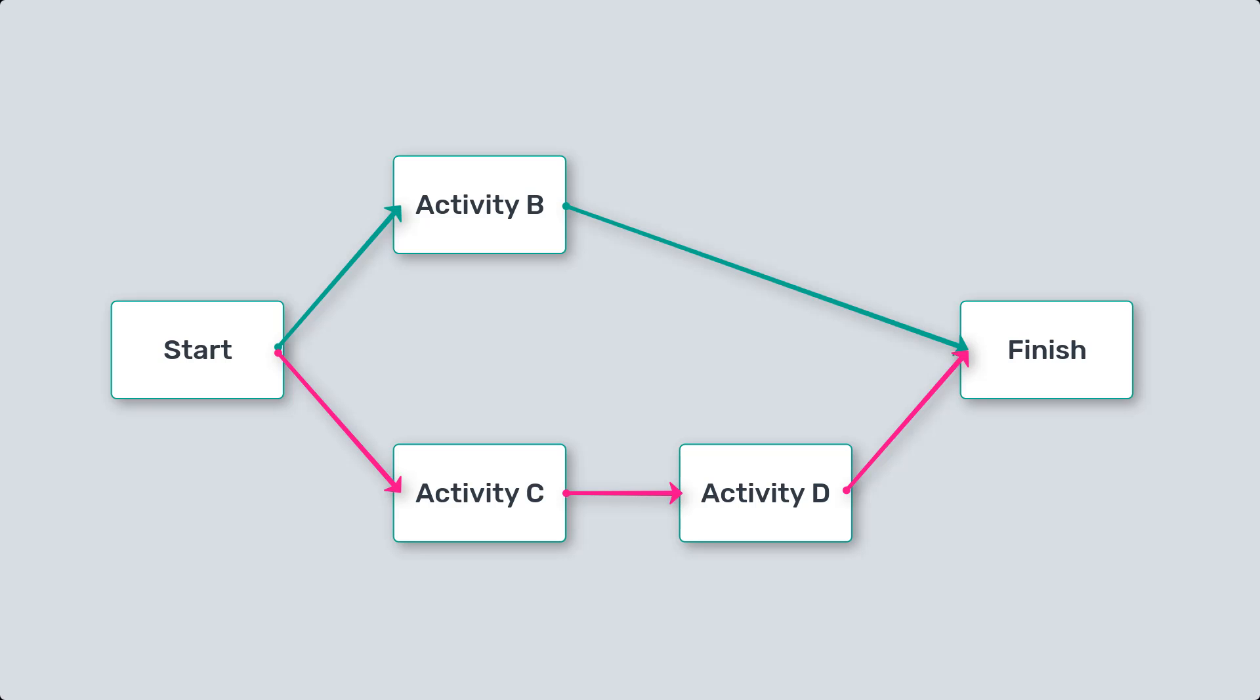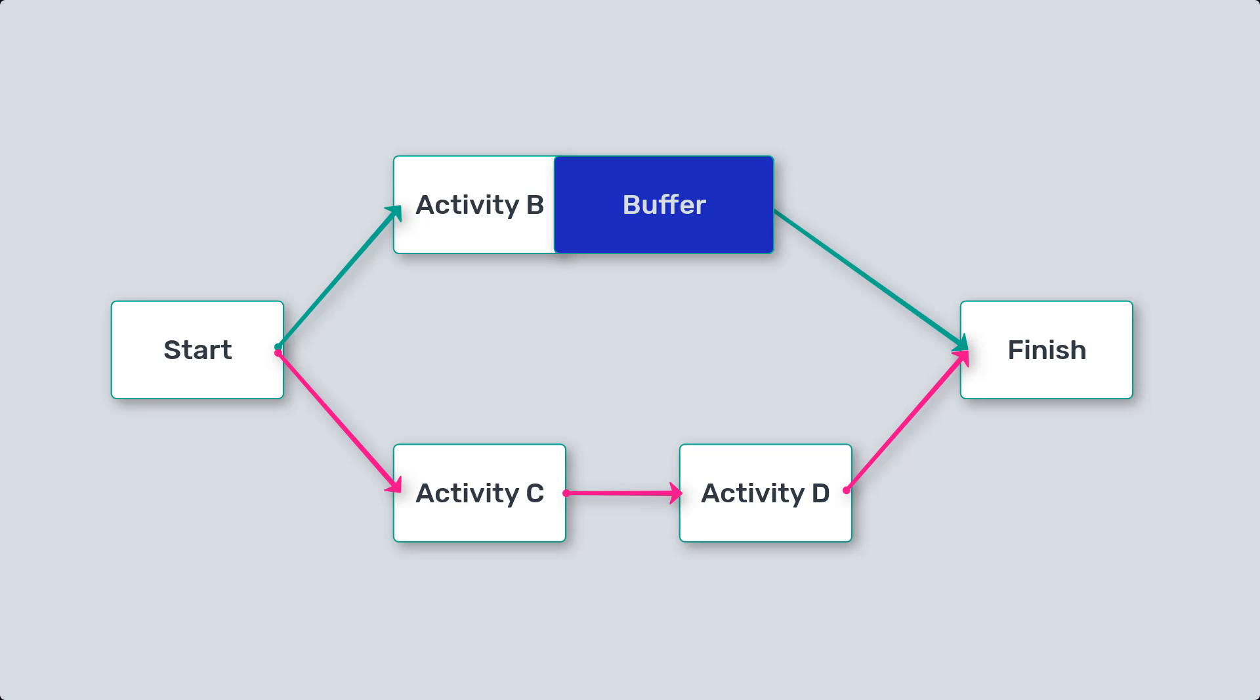To protect the project from uncertainties and variations, the critical chain introduces the concept of project buffers. These buffers are strategically placed at the end of critical chain tasks to absorb any delays without affecting the project deadline.